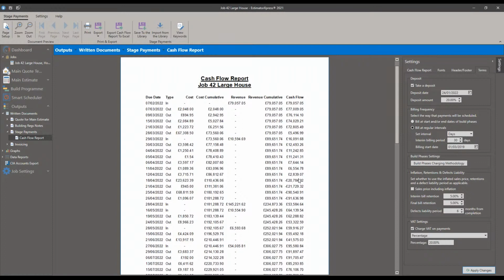So this is not good. Or as the Germans would put it, das ist nicht gut. It's kaput. You're going to be 20 grand out of pocket and hoping that things go well on that point, and you've got enough money in the bank to continue on. So looking at this, interim billing of every 30 days might not be so grand, or we need to have an absolutely whopping deposit.